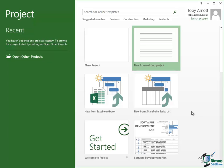Now if the sort of projects that you manage tend to be a little bit repetitive, you may find that there's a pattern in your projects and you like to take say the last job that you did, the last project you managed and use that as a starting point for the next one. Well that's where this particular option comes in handy because if you click that you can choose an existing project and use that as your starting point for another one.